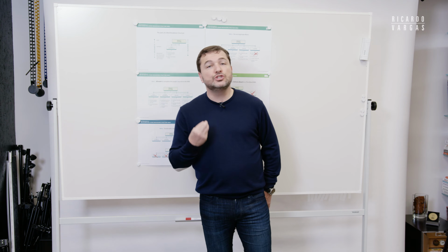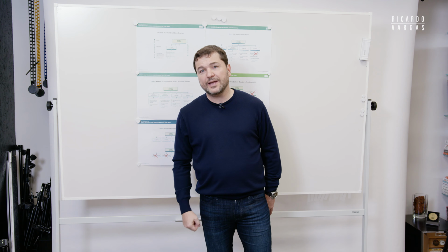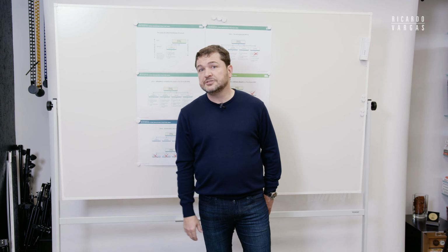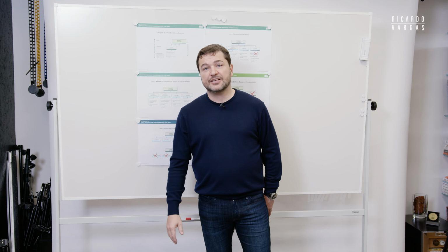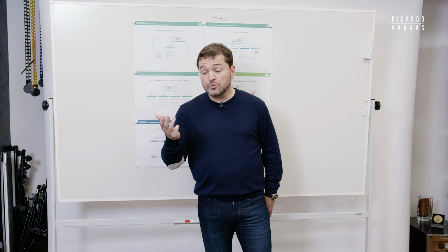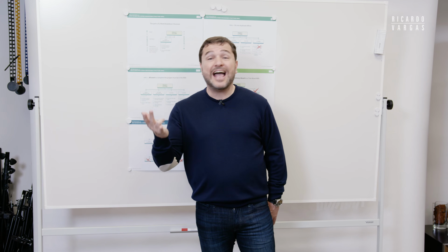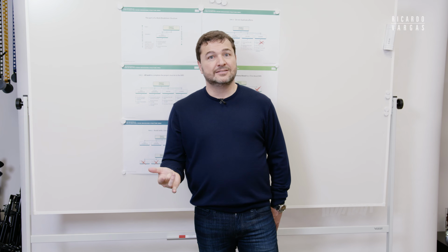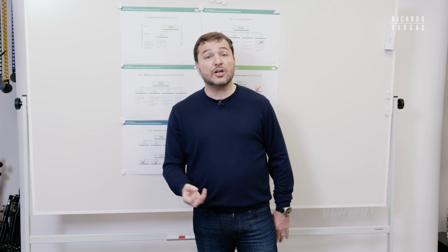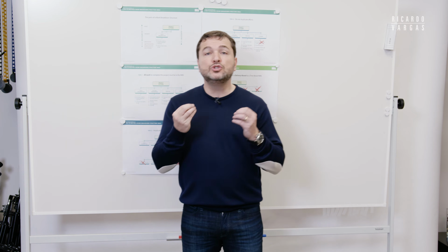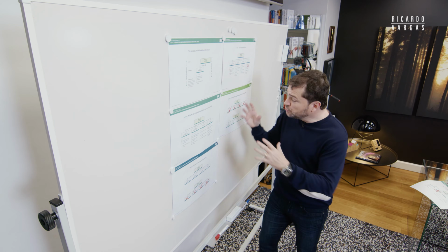If you want to show things chronologically, what should you use? It's not the WBS chart. You use a network diagram, a Gantt chart, a Kanban board, but not a WBS, because with a WBS you want to show the contribution of every single component to the bigger part of the project. So don't do that.